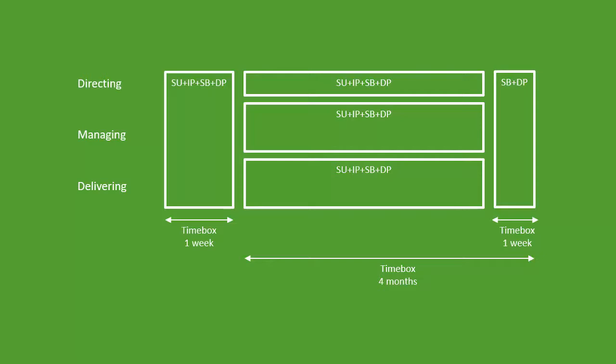users. And also on the controlling a stage, on the product management level, you would do progress follow-up. You would have a burn down chart for the whole project here, and you would look at the information radiator for the whole project. So you would get some information. Maybe you're doing scrum of scrums, you're getting information from the teams, and you're gathering it into one big information radiator for the whole project, one big burn down for the whole project. So we can see how the product is doing here by looking at information radiators, burn downs, and by looking, feeling, touching the things that are being released from the project.